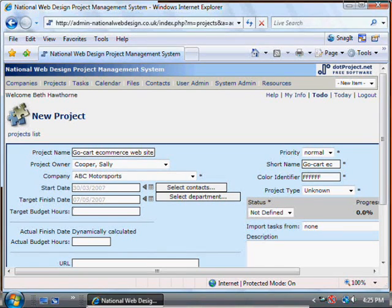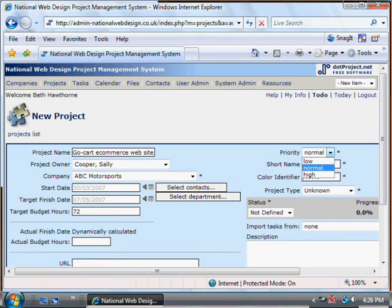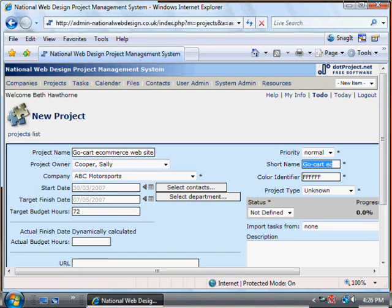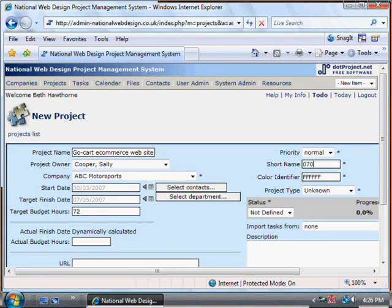The budget is entered in hours rather than money, so put in the number of hours assigned to the project or the number of hours you think are needed. Priority can be set as low, normal, or high. The short name should be the order number for the project rather than trying to abbreviate the long name, which may make it difficult to have a unique name. It's good to use the project number or order number here. If it hasn't got an order number yet, you can assign one at this point.